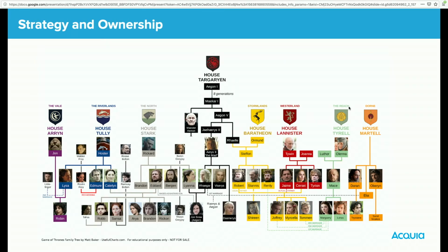So once you have all those roles defined, you need to determine who the actual people are that will fill out the team and make sure that they understand their role, the structure, and that they have time allocated for this. This is actually one of the biggest misses that we see, is that you put together this great family tree of here's all these people that you need, but then you haven't actually assigned a person to do that task or given them an allocation for it. It's just like, oh, do this on top of the 40 hours that you already have assigned. So you need to make sure that that's clear for the team.